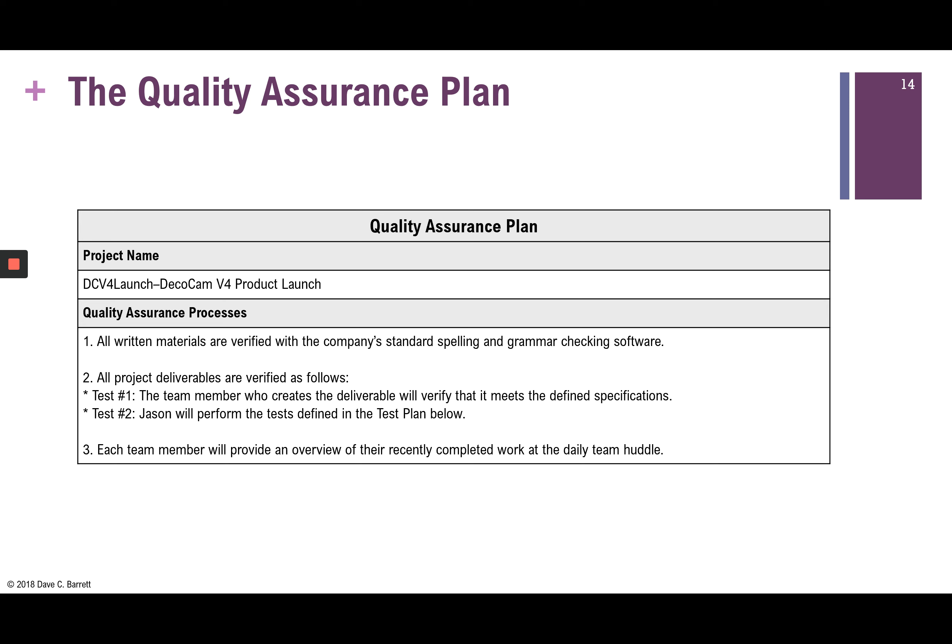The second process is that all project deliverables will be verified in two steps: first, the team member who creates the deliverable verifies it meets specifications; second, it is passed to Jason the business analyst, who performs tests defined in the test plan. Third, each team member provides an overview of their recently completed work at the daily team huddle, allowing others to point out potential defects. So step one in quality assurance is careful attention to process.